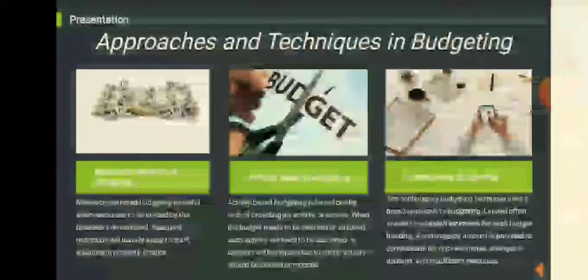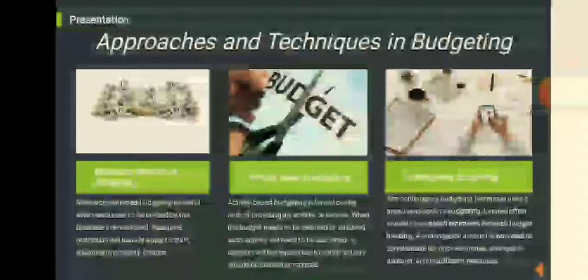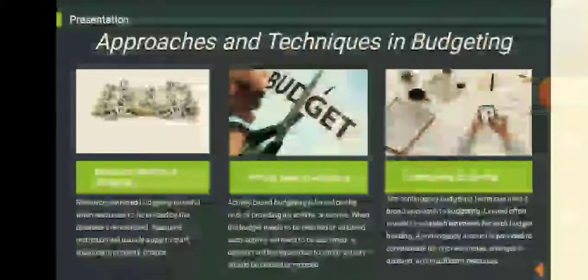Contingency budget can be used flexibly across any of the budget headings. The level of the contingency will depend on an estimation of the risk of error within the budget. If it is considered that the budget has been calculated to an accuracy level of 80%, then a 20% contingency may be added to the budget.